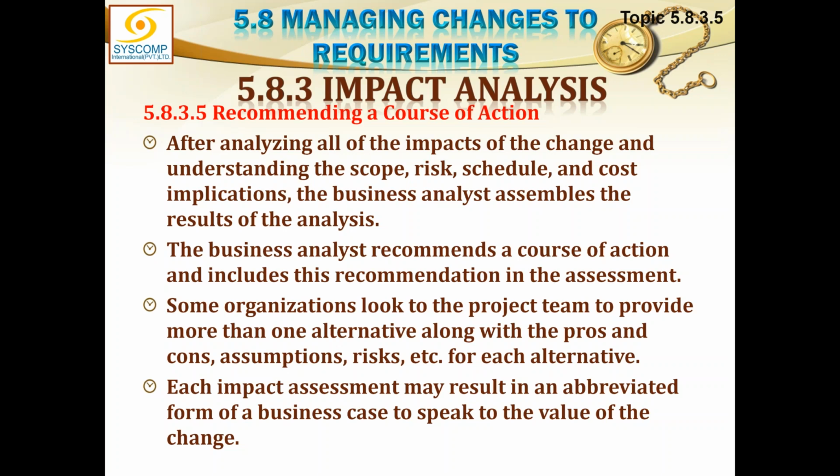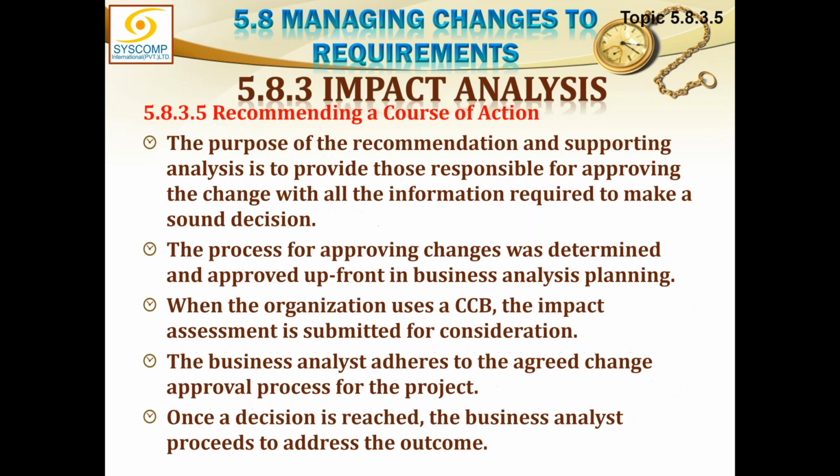Each impact assessment may result in an abbreviated form of business case to speak to the value of the change. The purpose of recommendations and supporting analysis is to provide those responsible for approving the change with all the information required to make a sound decision. The process for approving changes was determined and approved upfront in business analysis planning. When the organization uses a change control board, the impact assessment is submitted for consideration. The business analyst adheres to the agreed change approval process for the project. Once a decision is reached, the business analyst proceeds to address the outcome.